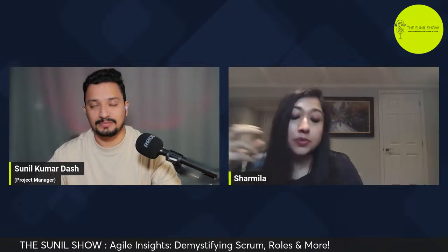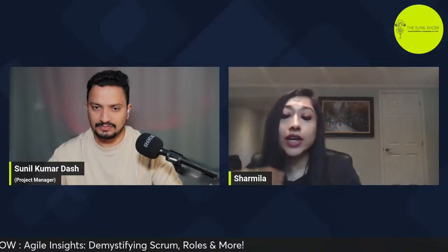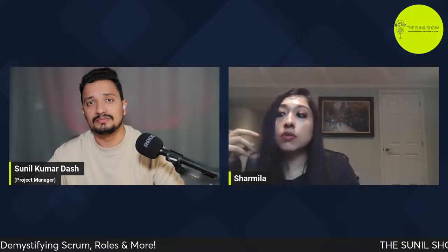For the daily stand-ups, it's a kind of 10 to 15-minute call between the developers, and the Scrum Master might also be present in that call. Basically we discuss what we have developed yesterday, what we are trying to develop today, and what are some of the impediments that we faced in yesterday's development, so that those impediments are removed and we can move along with the progress of the development, or with the velocity, right?